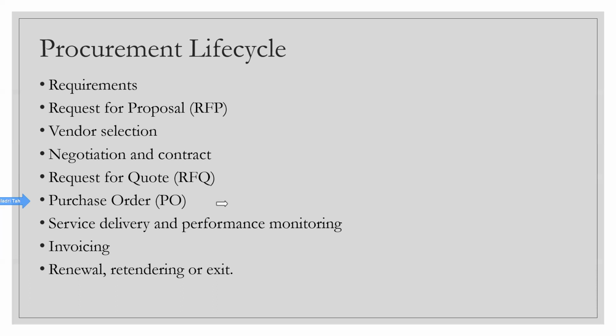So you vet the code based on the historic data, number one. Number two is that you also vet the code based on if you find something abnormal on the code. Let's say sometimes a vendor will be adding a section or a row called miscellaneous. They will be adding all the rows like switch one or switch X quantity 5. They will give you the value in dollars, right? And then it will say, okay, into 5, this is the value.